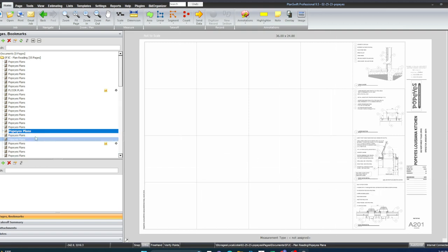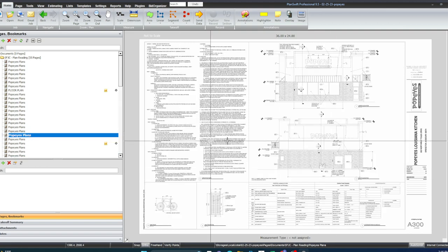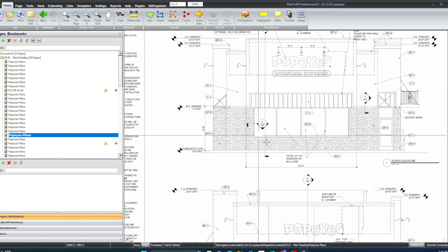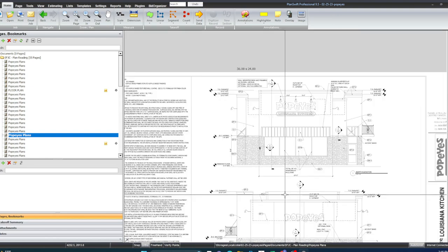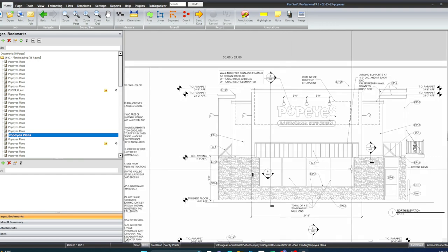All right, more roofing details, some more exterior elevation views. So depending on our trade, we need to have a view of the exterior of the building so we can determine a few things: how many square feet of paint we got to paint, or how much stucco, or how much brick veneer, or if we have to caulk the windows. How do we determine that? Well, that's what we need elevation views for, because it makes it very, very clear.